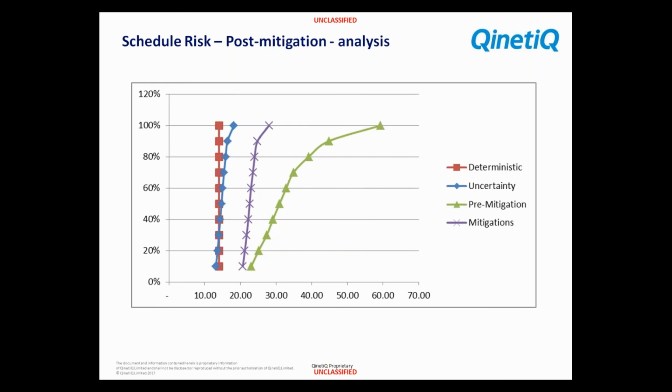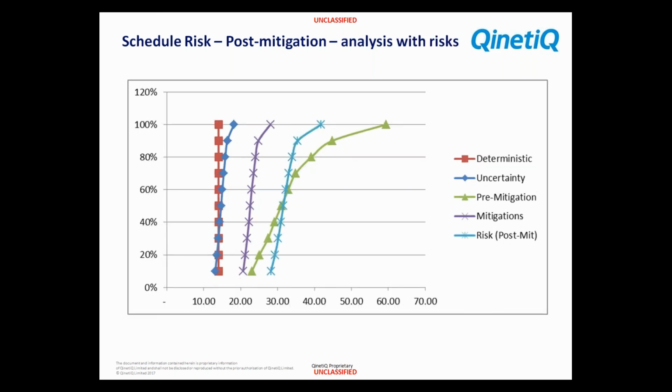So what we've now done is add that purple S-curve, moving the unmitigated, the uncertainty, the blue line, to the right, adding the duration, the time it takes to do the mitigation actions, and then recognizing that there are some residual risks thereafter, so there are some post-mitigated risks as well. So that light blue line, again, is the post-mitigated risk situation: how long it might take if we invest in those mitigation actions, and again, completely transparent.